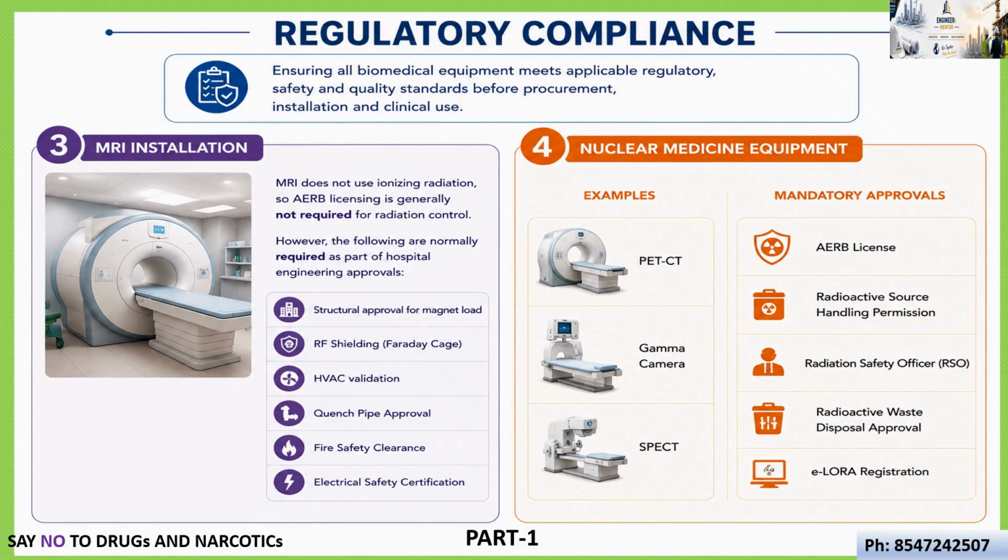It is a systematic approval process with AERB following the government of India. It is the online portal application process. X-ray machines, CT scan systems, cath lab, mammography, fluoroscopy equipment, and LINAC radiotherapy equipment like LINAC, cobalt unit, all need AERB approval licensing process, which has to be applied through ELORA.